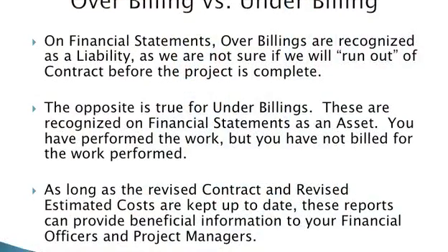I may have earned the right to bill that much, and my project manager knows that. So when I show him this report, he's going to say, oh yeah, so-and-so is going to give me these invoices for $40,000, and that's going to bring that percentage of completion on costs up to 38%.